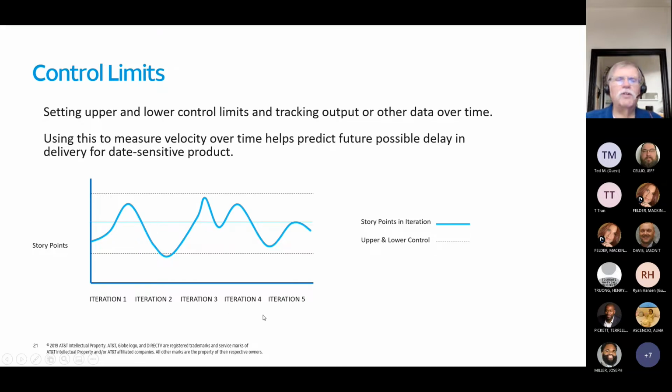And that's the thing. In general, what we're doing is we're taking a look at things all along the way. Anytime we hit a time box, we've got a formal review. We've got a retrospective. If we find out we've only done 15 story points this iteration, let's dig into that because we usually do 21.